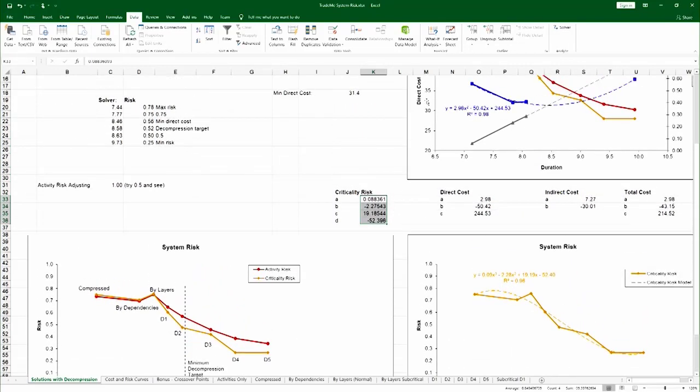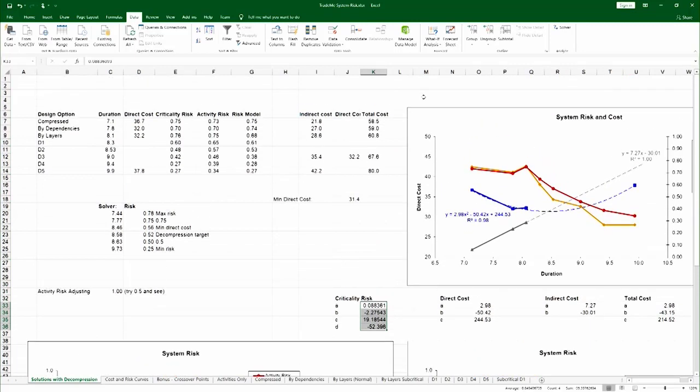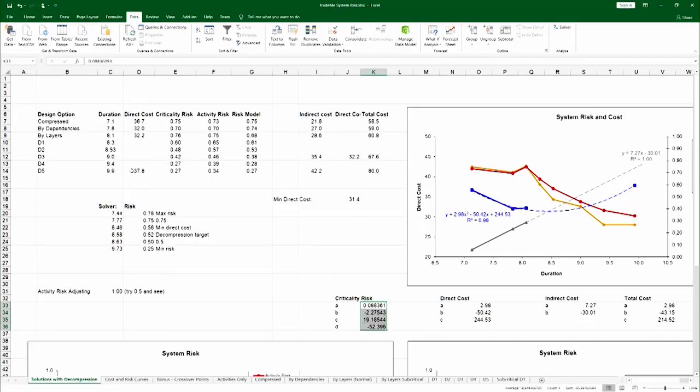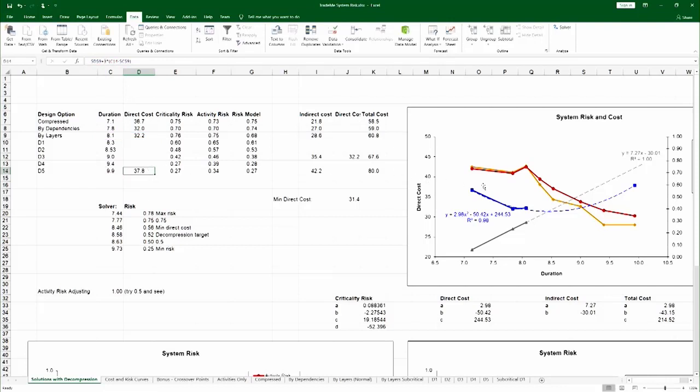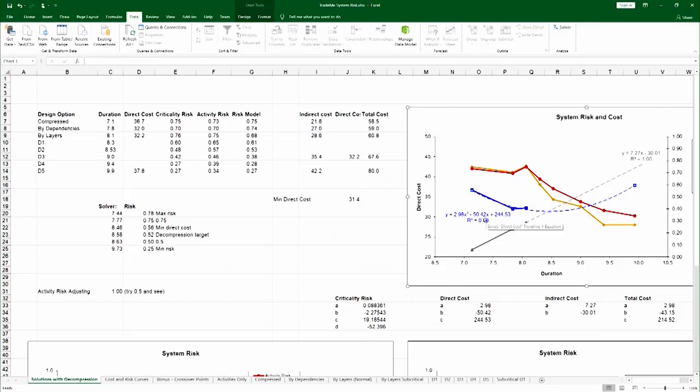The other thing the design team had to do is to calculate the direct cost at those points of decompression. And if you recall from Chapter 13, that's done by adding the cost of three developers over the time span of the decompression. Once you have that in place, you have a rebuilt direct cost curve and you can actually have a correlation model for it.